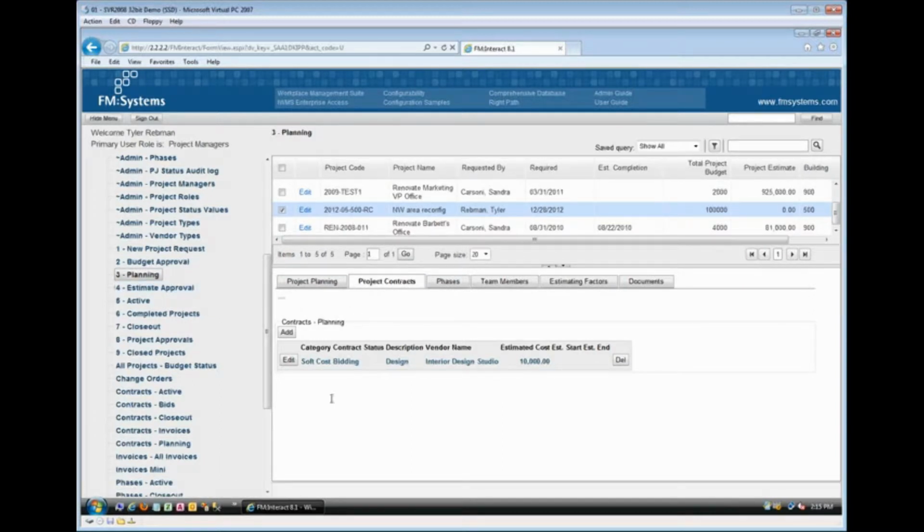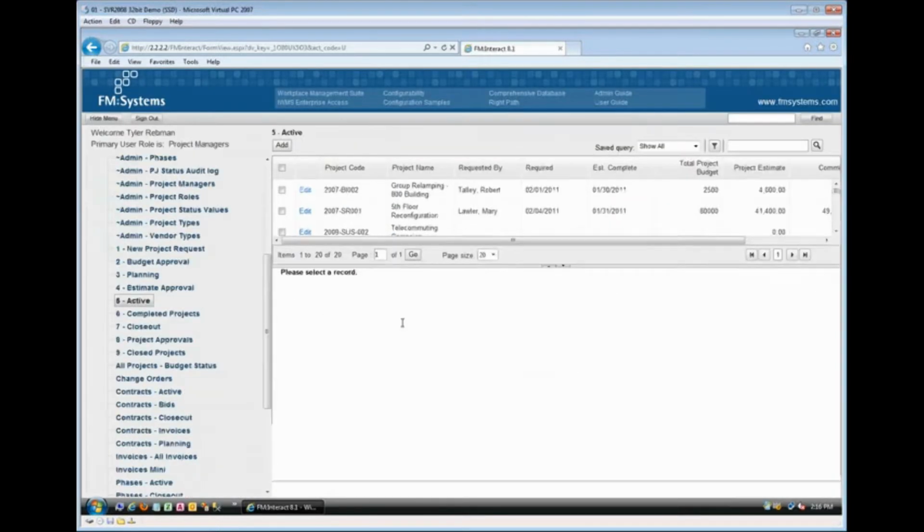Okay, and so simply you're going in and you're saying, okay, let's look at the details of all of these bids, make sure everything is kosher here, and then let's approve this. And maybe after that process you find out it's not 100 grand, it's actually going to be 120,000. We were off. So again, we might want additional approval at that stage of the game, and you can do that, okay? And then ultimately, once that gets approved, it will go into an active project status, all right?